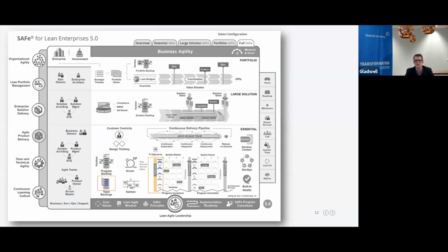Waterfalling the iterations. So in iteration 1, do exploration, in iteration 2, do the continuous integration part, and then in iteration 3, do the continuous deployment part. Or even worse, waterfalling the PIs to do such work per PI. This is just making that more clear and underlining that.